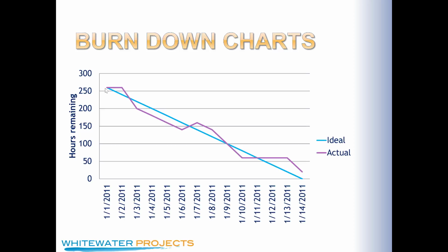That's how Burndown works. If everybody is updating their hours remaining, then the Burndown chart will burn down appropriately, and you will be able to see it tracking, trending, and whether you're actually going to make it or not. So this chart is obviously on the last day of the sprint. If it was on the 5th day of the sprint, it would be right about 5, right there. So you have this purple line up to this point. None of the rest of it would show. This whole part wouldn't show. You'd have the trend line, and you'd have this, down to here.